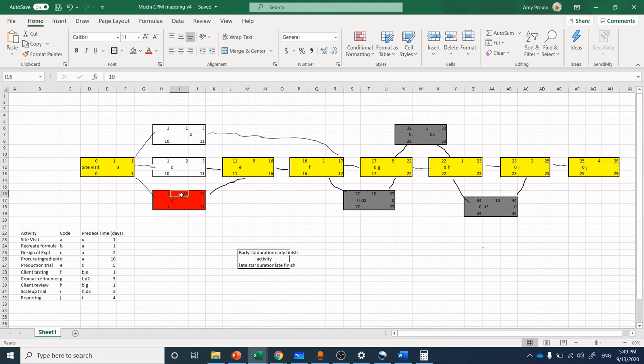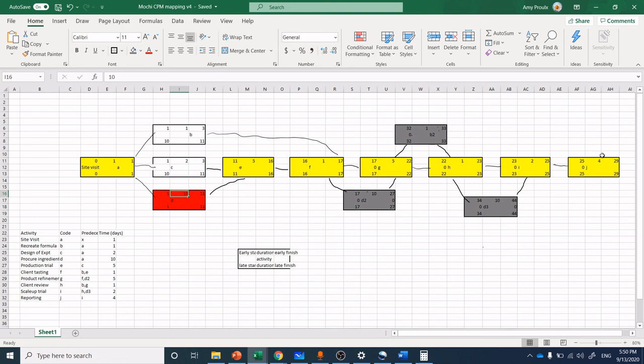But what we did by doing this mapping was we found the areas where we had the most constraint and we were able to subordinate the work and be able to identify how can we reduce that time constraint. How else could we do it? We could find a supplier that maybe doesn't take 10 business days to get to us. We could be asking the question, hey supplier, could you get it to us by express courier and while we may be paying more up front for express courier, we are not having the same time frame and we are shrinking down that project and the cost of labor is going to decrease. These are the sorts of questions that are going to consistently come up and therefore the reason why we want to be doing these sorts of charts.